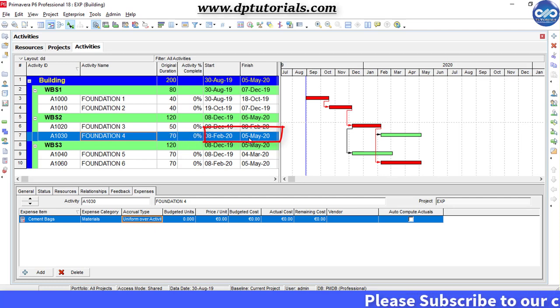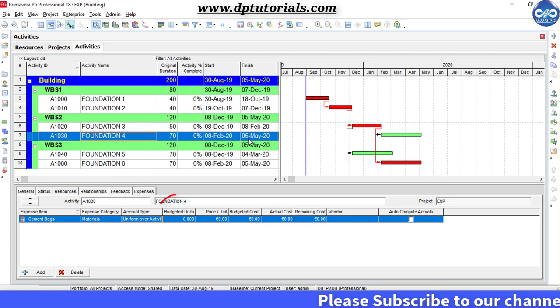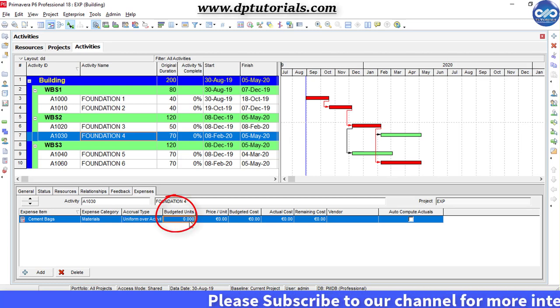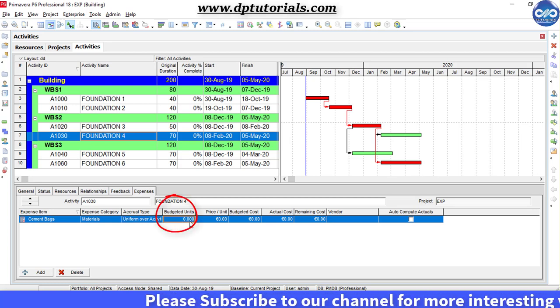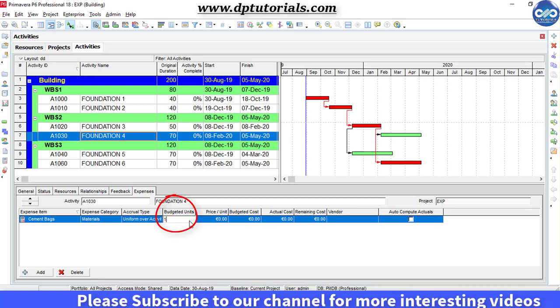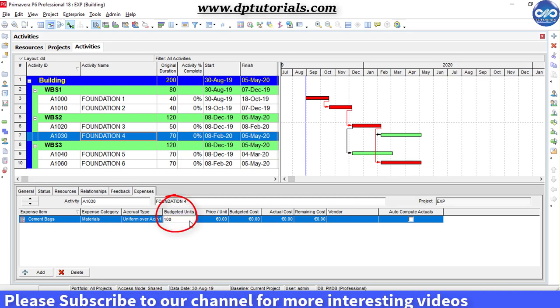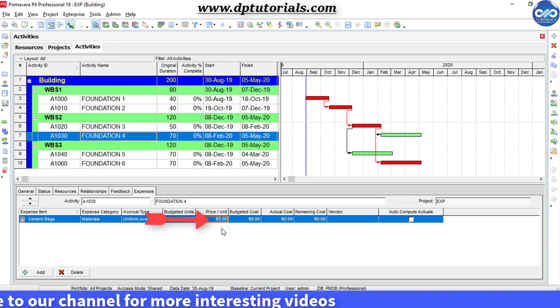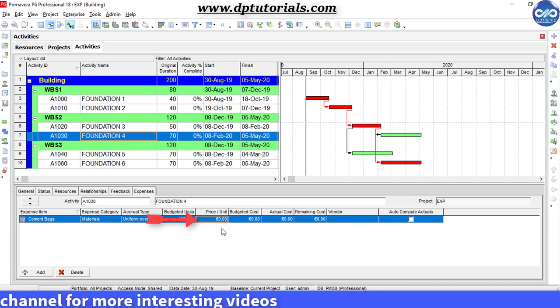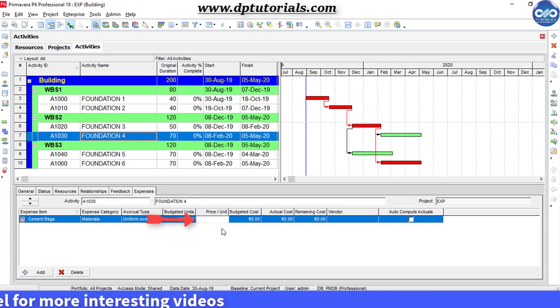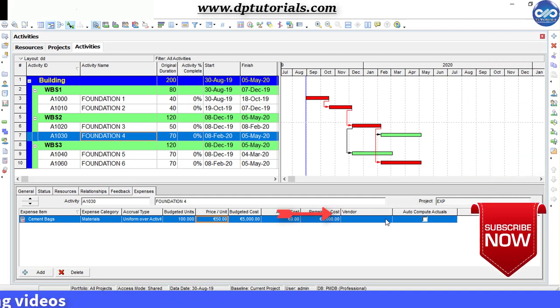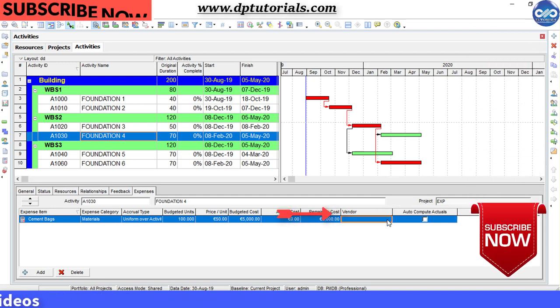For budgeted units, you can mention the quantity here, say 100 cement bags. You can mention the price per unit, say 50 euros per unit. Another field which may be useful is the vendor name at the right corner.